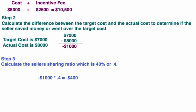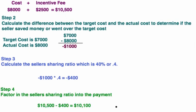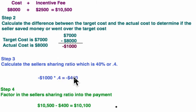Step number four: factor in the seller's sharing ratio into the payment. We take the original $10,500 and subtract $400, which is their sharing ratio responsibility. $10,500 minus $400 equals $10,100, which will be the check we write them and the answer to this question.